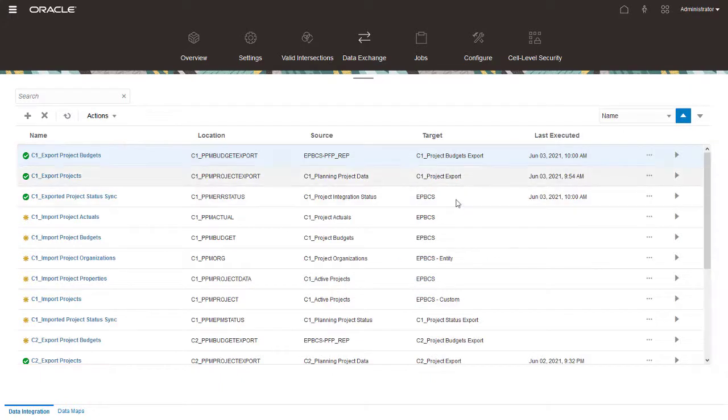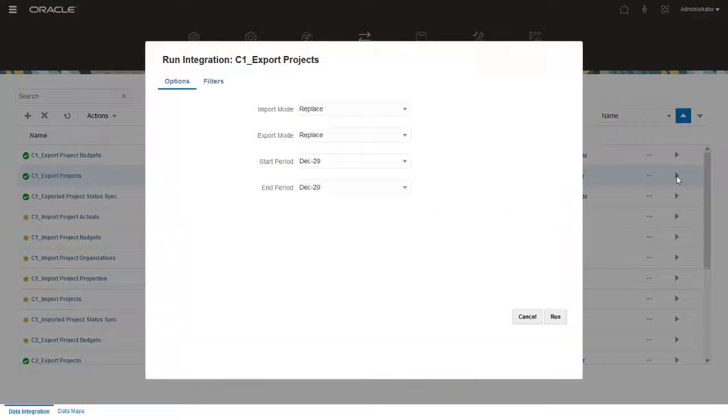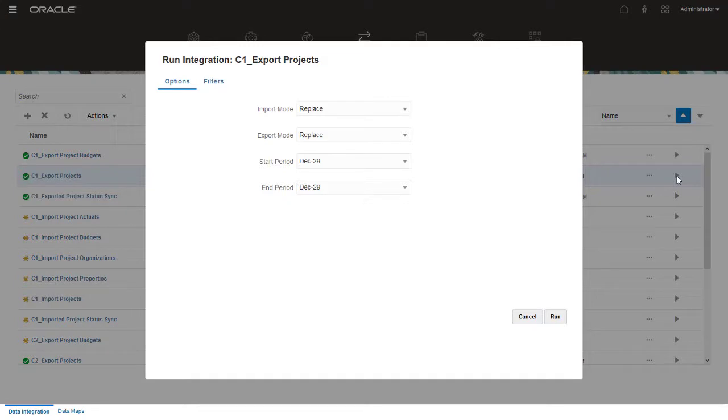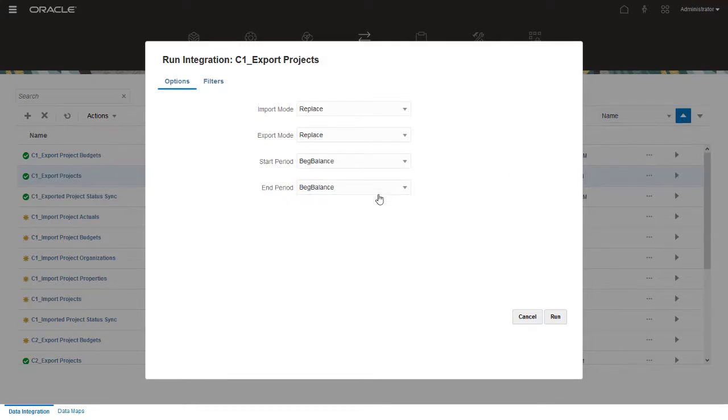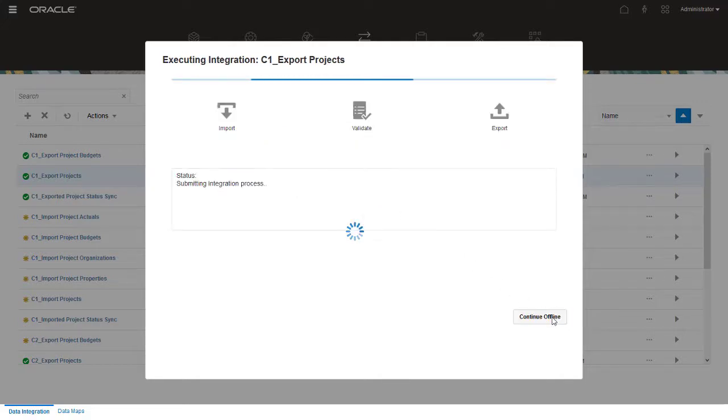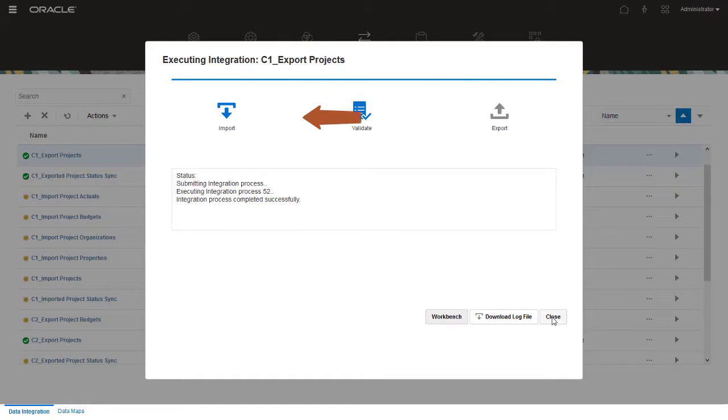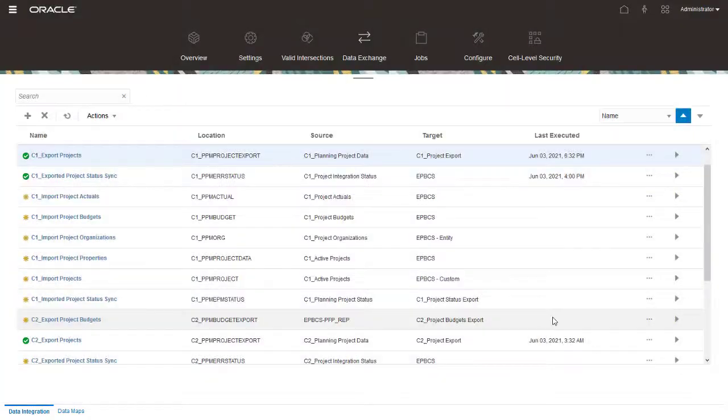First, run the Export Projects Integration Job to create new projects in Project Management. I'll use the beginning balance for the start and end period. I'll keep the other default settings, and click Run to start the integration. The integration completed successfully. Click Close to return to the Data Integration page.